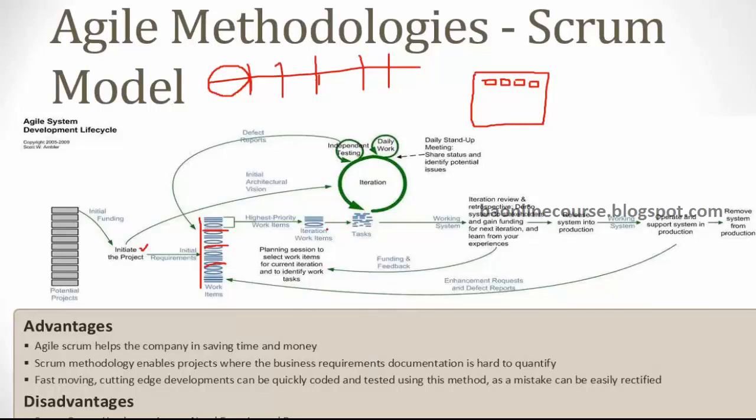Okay. So you'll pick up the set of 5-10 requirements which are important, and then you do that in the first iteration. Now, since you're only picking up a subset of your requirements, it will be done faster, right? And an iteration would have all your steps of requirements, design, development, and testing. All of them would happen as part of your iteration, right?